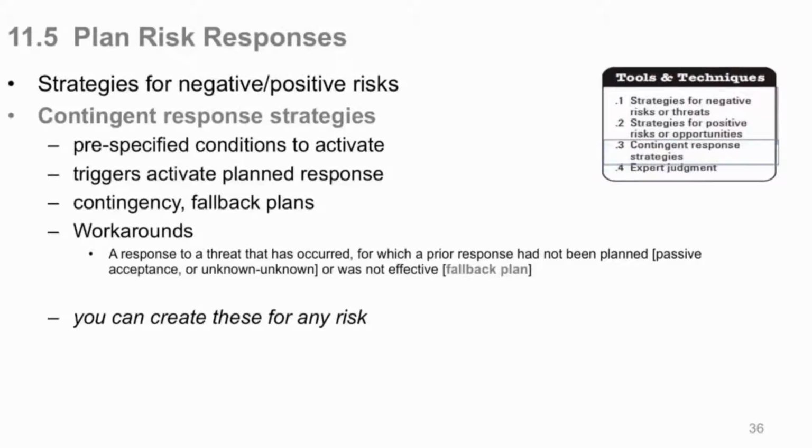So a workaround is a response to a threat that has occurred, for which a prior response has not been planned, such as passive acceptance, or a known unknown, or was not effective, such as a fallback plan.